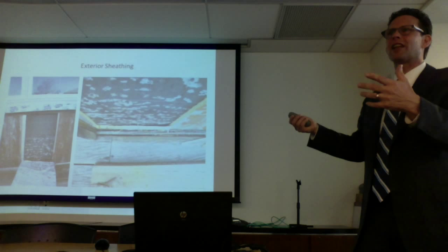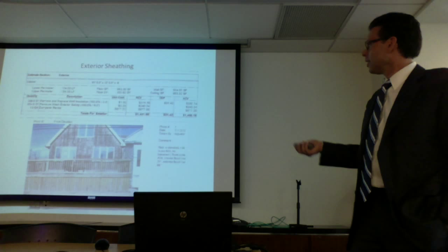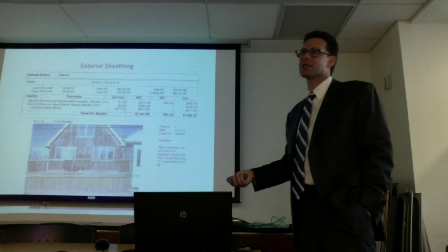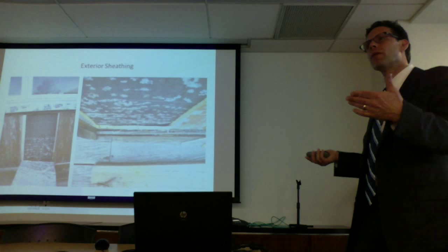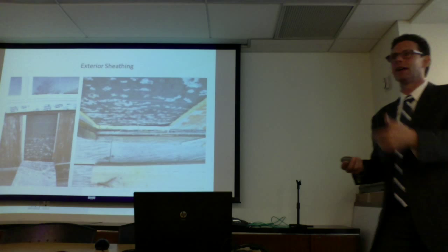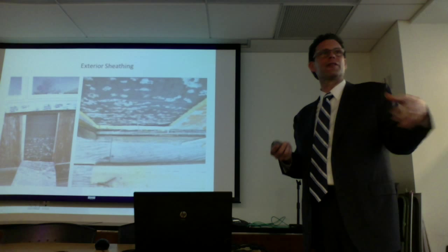So this is this house, pressure washed exterior siding. If they paid for the subfloor in the house, they owe for the siding outside. They do. The only way to get to this is to rip all this stuff off. I have to take off all the other stuff. If I'm removing the siding, I got to disconnect the deck to pull it away because siding goes behind it. I have to take the railings off, the numbers of the house, the light fixture, the hose reel. I have to take all that off just to be able to do this work.